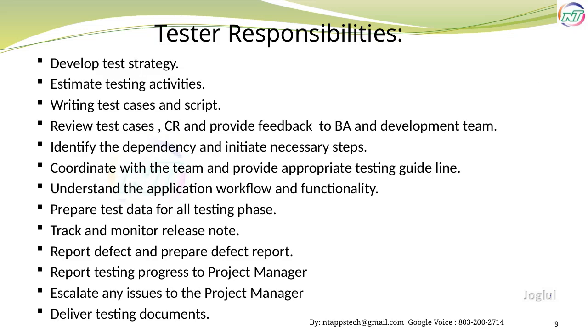When developing a test strategy, it's important to estimate all the testing activities carefully, starting with writing detailed test cases and scripts that cover the application's workflow and functionality. Once the test cases are prepared, they need to be reviewed alongside any change requests, and feedback should be given to both the business analyst and development teams to ensure clarity and accuracy. Identifying dependencies early allows us to take the necessary steps to address them, which helps avoid delays later on.